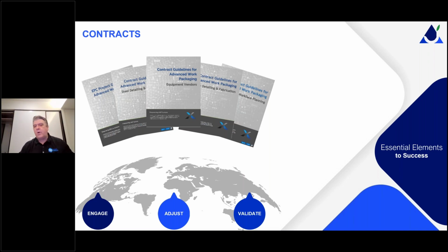And here's the type of data that will be shared. Then, as the project is in its implementation phase, the teams can determine, based upon what tools we have and what's being used, the type of data I need. It's a budgeting issue, to make sure that there's budgeting. There's also, in contractual requirements, budgeting for dedicated teams. It doesn't work without dedicated planners.